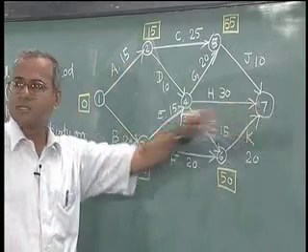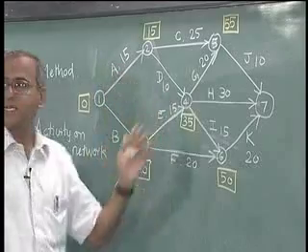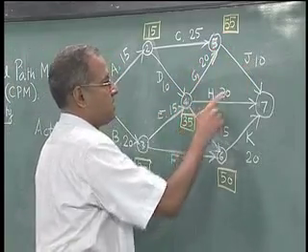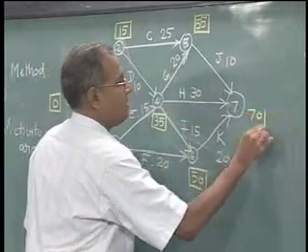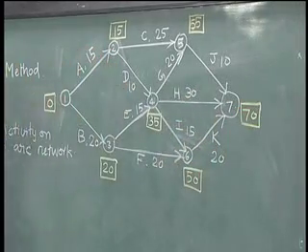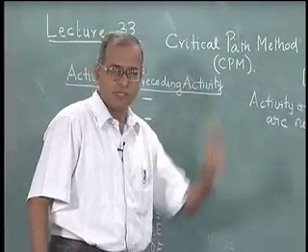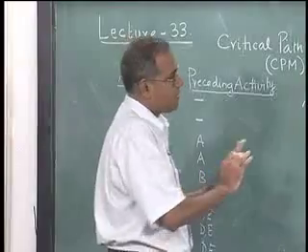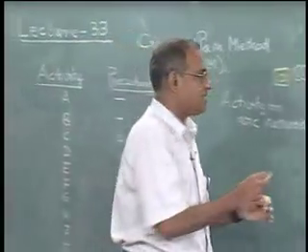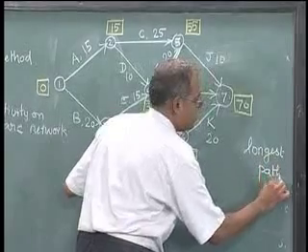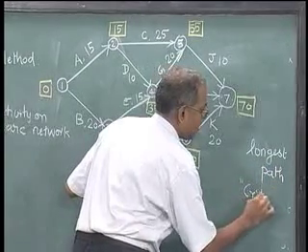and this represents the point at which J, H and I are completed, which is the maximum of 65, 65 and 70. So, 70 comes here. So, 70 is the time where this project will be completed, and 70 represents the earliest completion time of this project. So, what we have done is we have used a labeling algorithm that essentially finds the longest path of the network, which is also called the critical path